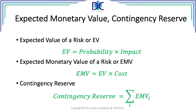Once we have the expected value, we can determine the expected monetary value by multiplying the expected value by the cost. For example, in the delay scenario, if each day of delay costs $1,000, then the expected monetary value of that delay will be equal to $6,000. On the other hand, where we already have the expected value expressed as $10,000 in monetary terms, the expected monetary value is equal to the expected value.